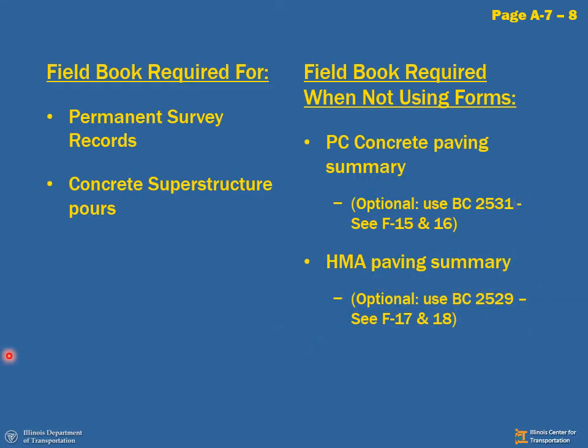What are some of the requirements for field books? Like I said, if you go to your doc guide, page A7 and 8, we can look and see what some of the requirements are. Field books must be hardbound. They cannot be spiral bound. There again, we don't want to be removing pages from our field book.